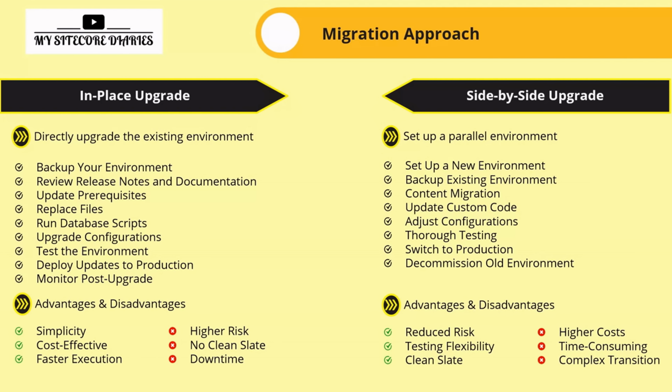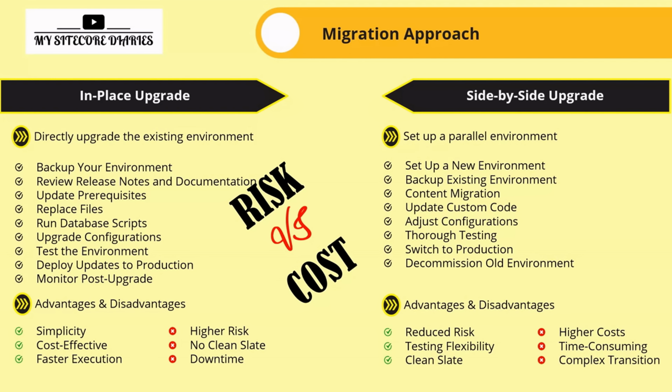If you need a quick, cost-effective upgrade, then in place upgrade might be a suitable one. However, if minimizing the risk and ensuring a clean transition is your priority, then the side by side upgrade is your better choice. So basically, for me, it's risk versus cost. With an in place upgrade, there is a high risk. With a side by side upgrade, it is a high cost. Choosing the right approach depends on your project goals, available resources, and tolerance for downtime. So you need to take your decision.